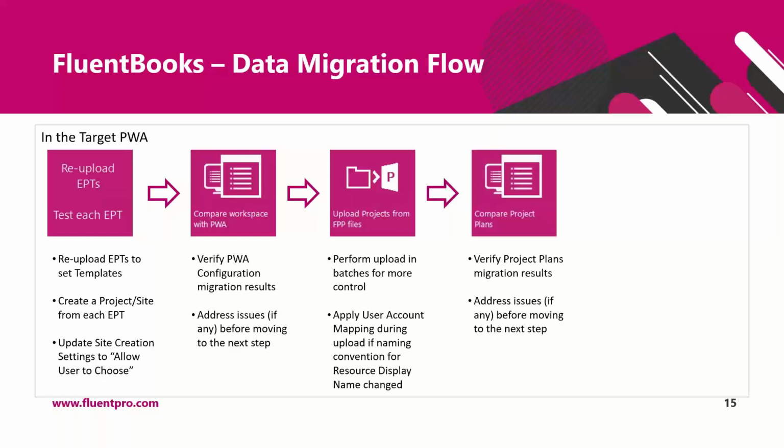After projects are uploaded, the next step is to verify project plans migration results. There is a wizard called Compare Project Plans. This wizard also builds a comparison report in an Excel file, which shows the differences and discrepancies for the projects on the project level, on the task level, and on the project team level, if there are any. Same as with configuration, we recommend addressing any issues with projects before moving to the next step.